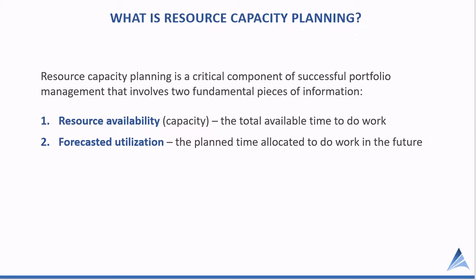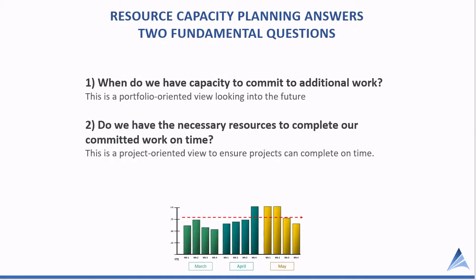We covered this topic in more detail in our previous video on capacity planning, but we want to provide a quick review before jumping into best practices. We're really looking at the availability of people to do work and comparing that against their forecasted utilization — how much time is allocated for them to do work in the future. If people are forecasted to do more work than they have available time, then we're going to have a resource risk, and that prevents us from executing against the portfolio.